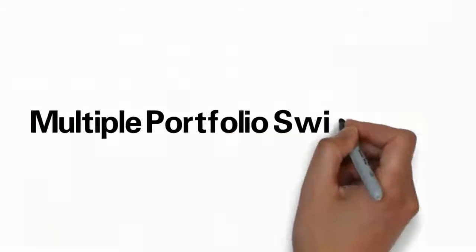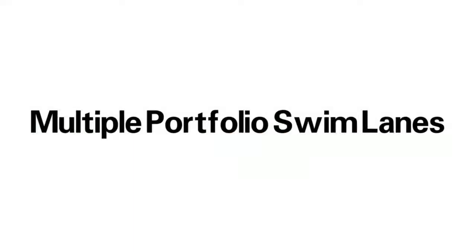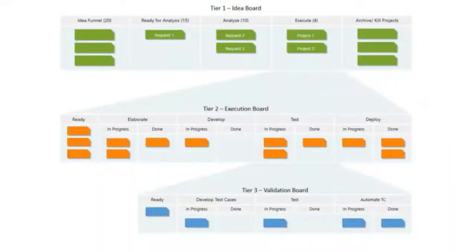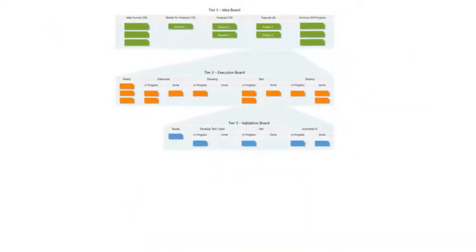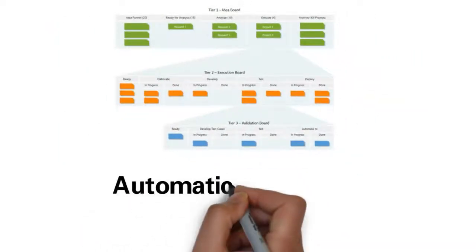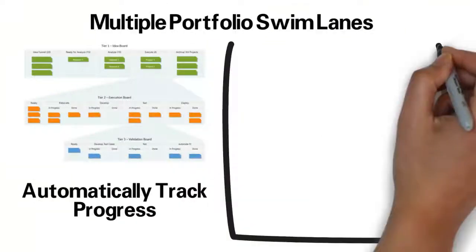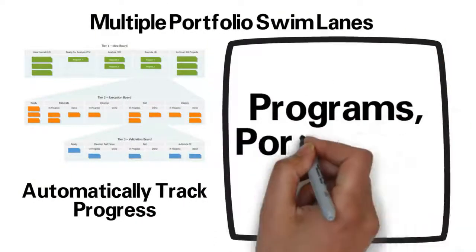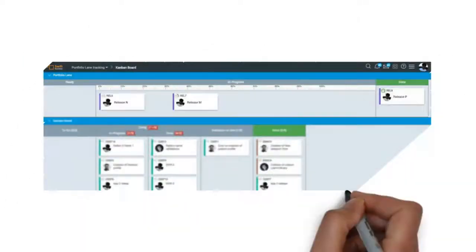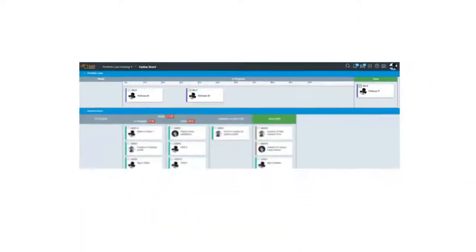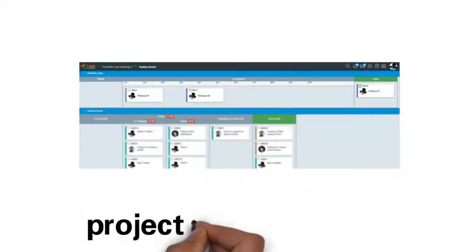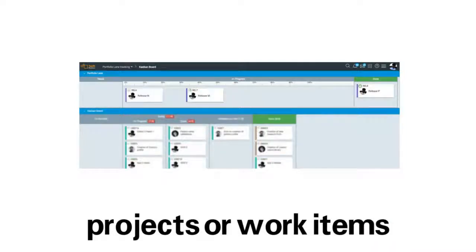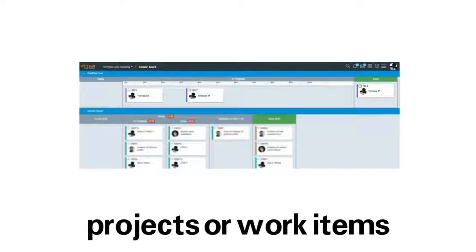Multiple portfolio swim lanes. This unique feature allows you to model one or more portfolio lanes in a hierarchy to automatically track progress at various levels, such as programs, portfolios, and initiatives. Cards linked to lower-level objects, such as projects or work items, move automatically in their portfolio lanes as the linked lower-level objects get completed.